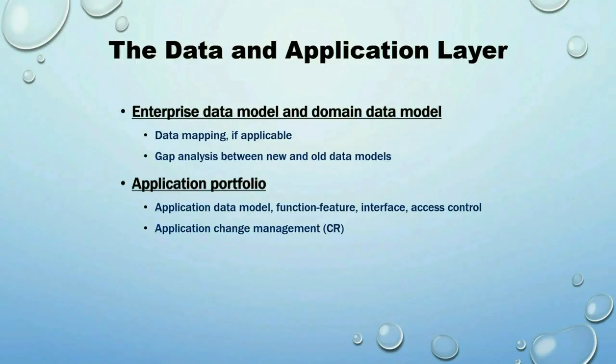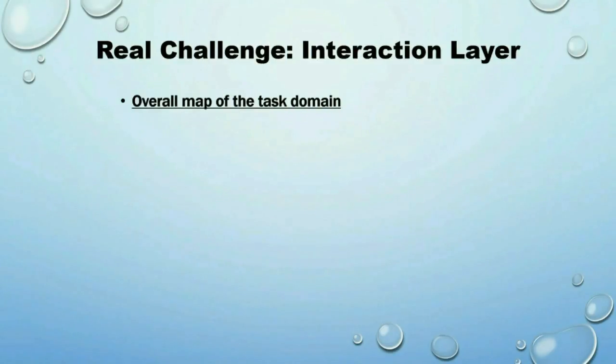From the user side, obviously you need to have the requirements forwarded to the vendor, and then there's a back and forth negotiation about resource concerns and prioritization. And when it's all over, the changes in the new application may have ripple effects into your existing data and system model, and where it's going to cause changes is a big analysis item that you need to keep in mind. Now buckle up.